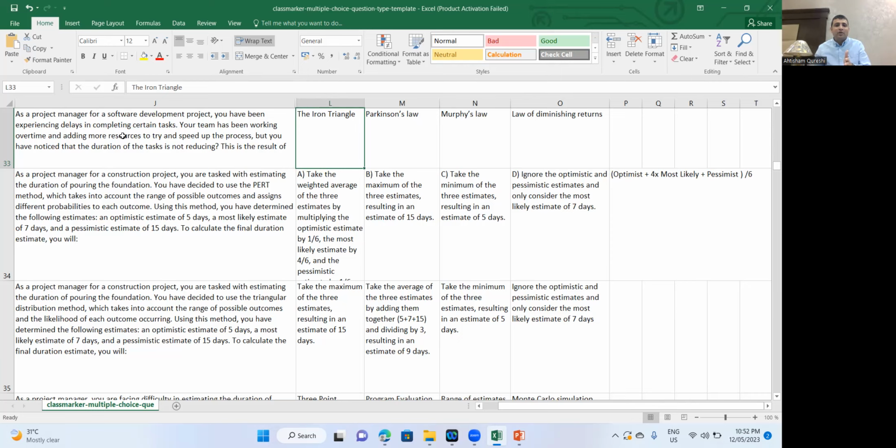It will not always happen that if you can get the work done with one resource in 10 days, adding two resources gets it done in 5 days, and adding three gets it done in even less time. It may not happen that the duration is reduced.